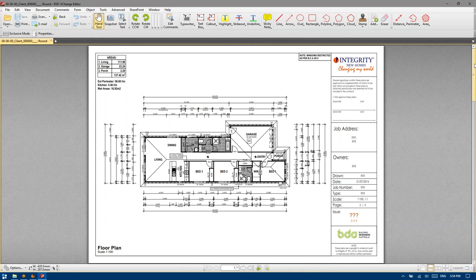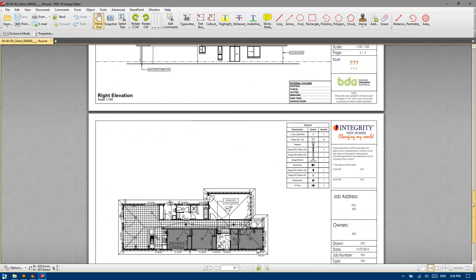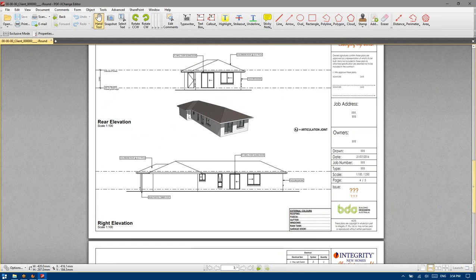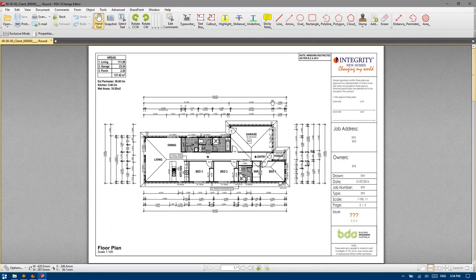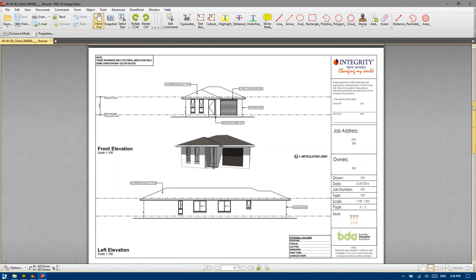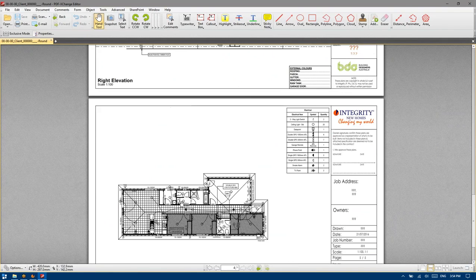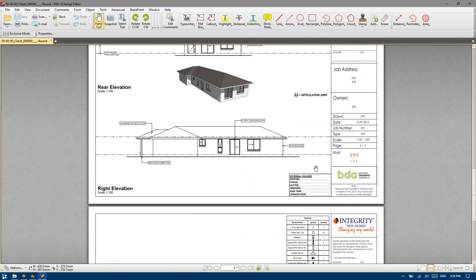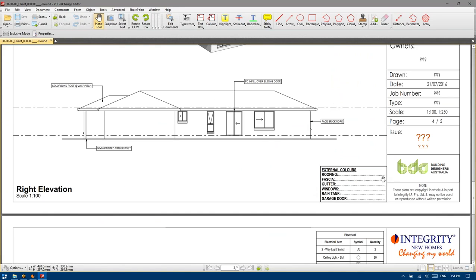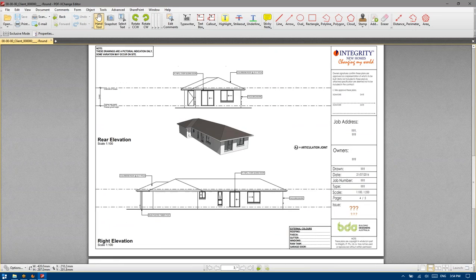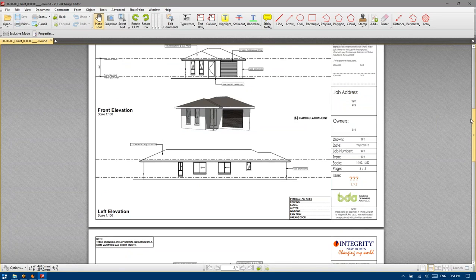We then turn that into a council set of plans, which is effectively the working set that we estimate from and the set that goes to the local authority for approval. This would be effectively a contract or round set of plans — it's got cute pictures and doesn't have any sections or slab plans or information that's probably overkill at the time of issuing a contract. Upon contract signing, we get a council set of plans complete. What we've done is add this colour block on there so that we can start writing these colours in and getting them printed on the final construction set.